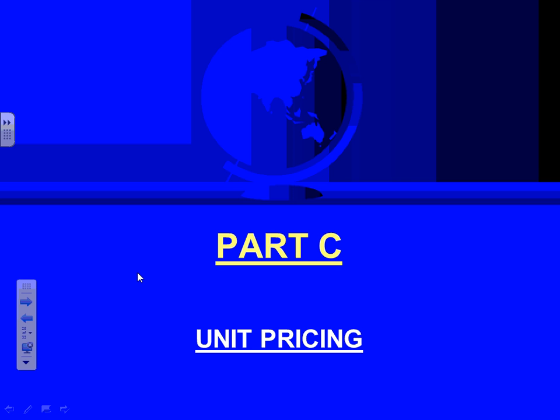What is a unit price? If you're a developer, and every time, guys, a city comes and you develop homes, 4,000 square foot homes in an area, and every time you develop them, you're going to charge the customer $15,000 to completely install the whole electrical system for this house. And they're going to build 24 units. So you take $15,000, multiply them by 20 units, and that will be your unit price. That's one example of unit price there. The other example of unit price, Adam, is if you have a service change.